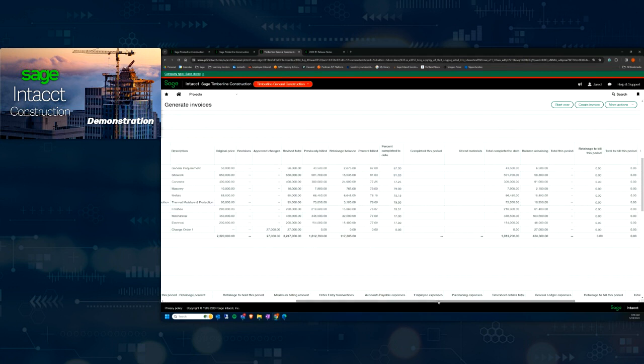All right. So as we start to go through this process, again, as we know, we're just going to update the percent to complete. So if I wanted to put in 88%, just as example, 80. As you see, I'm just going to go ahead and populate some of those different fields, some numbers in there real quick. And as we go through that, you're going to see the system does all the calculations for you as you expect. But the nice thing here is if you wanted to go back and change any values for whatever reason, such as maybe this period, I just prefer it to look as 1500, I can update that value and it's going to back calculate that percentage just for us.